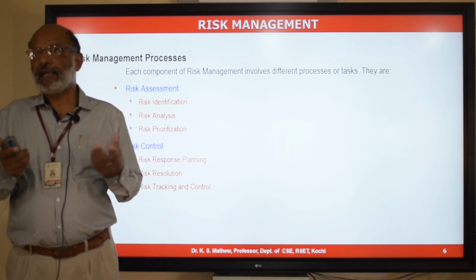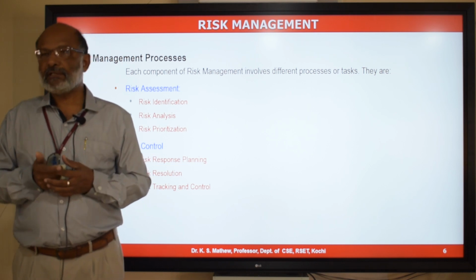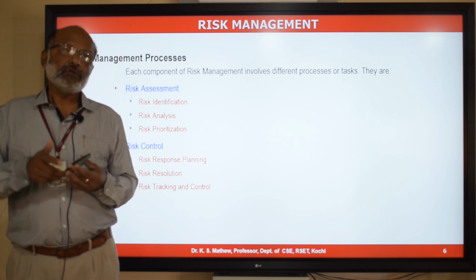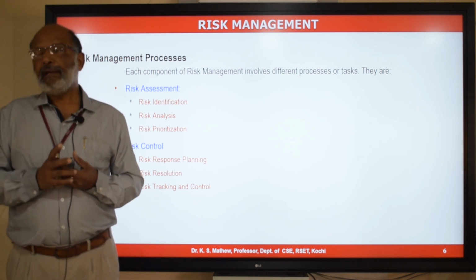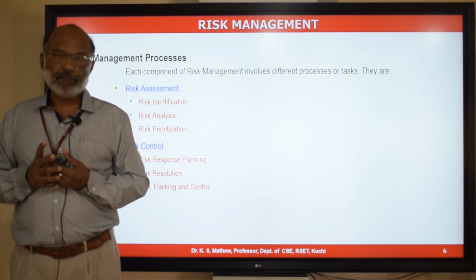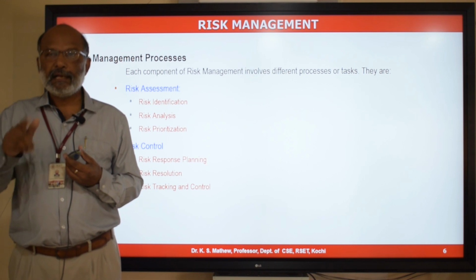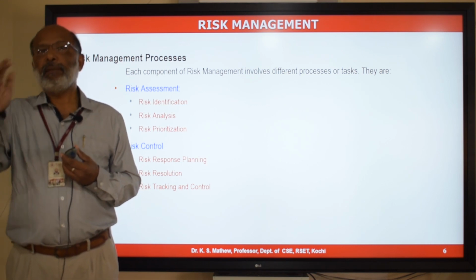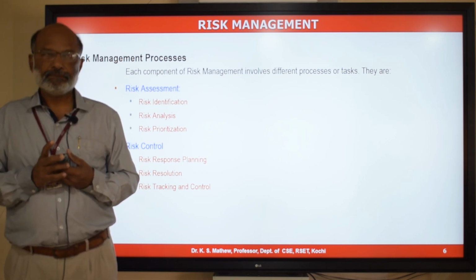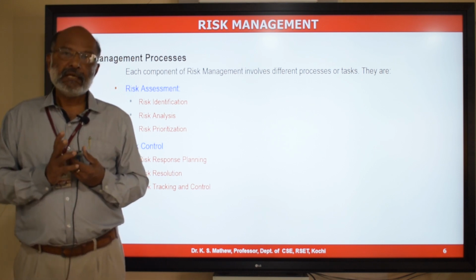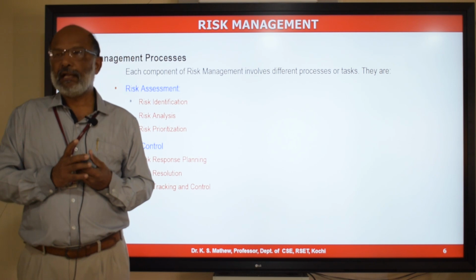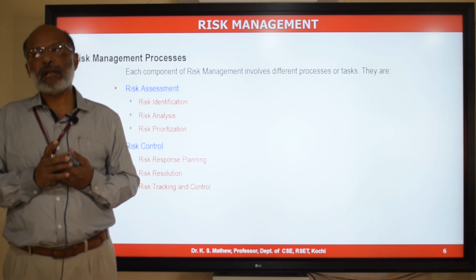So as I said, as part of your project status and progress monitoring every week, you should also include risk reviews and track and monitor all the identified risks, and analyze, reassess the priority and update the priority in the risk register. And as part of that, you may also identify some new risks which were not originally identified as part of your project initiation and planning.